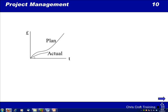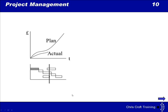You should always be suspicious if you're underspent because it probably means that you're behind. So how do we check progress? And the answer is have a look at a Gantt chart. And here is the Gantt chart that goes with it. And sure enough, we're behind.